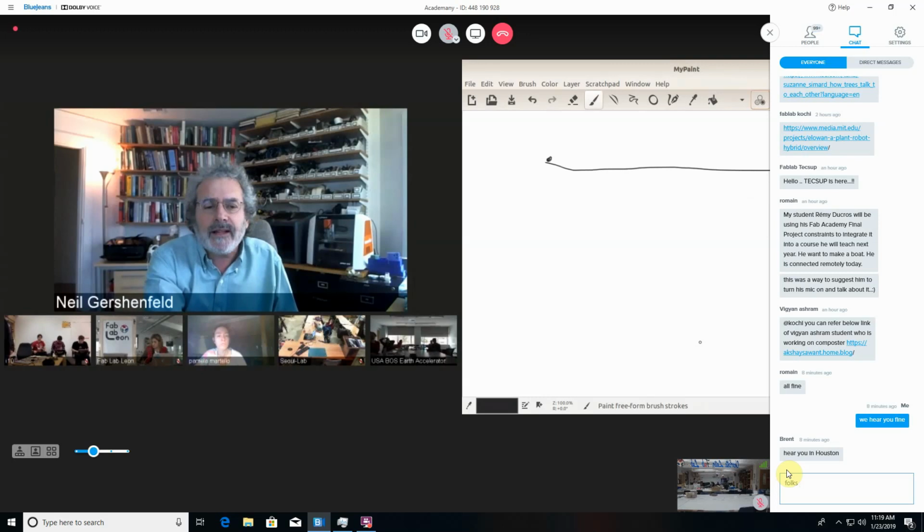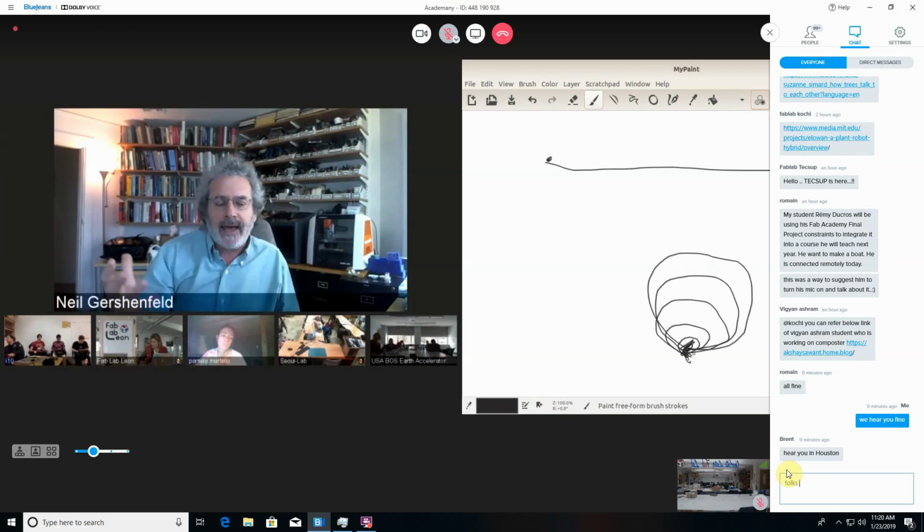What spiral development does is, let's take the example of the website. Here you are today, at the end of a week, you have the website. A spiral is a complete loop that ends with something working. And so a first spiral for this week is to use the web template we gave you. A second spiral would be to edit a little bit on the template but republish it. A third spiral would be to put some new content on the site. A fourth spiral would be to change the template. And then another spiral would be to eliminate the template and replace it with another web protocol.